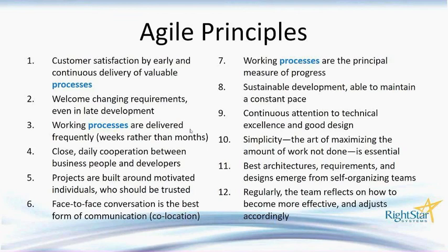But when we're working with the tool implementation, we want to start with a particular module or process, gather the requirements, implement according to those requirements, review, and then put that into the live environment. It allows us to get quick wins, buy-in from the organization, and again, if there are any adjustments that need to be made, we can adapt more quickly as we move on to the additional processes or other features of the tools with which we're working.